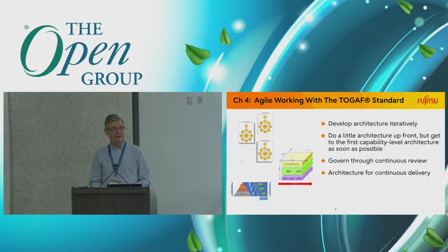So that can often come down to simple things like having software switches through your system so that you can turn bits of it on and off again, and planning in advance how you would roll back a change if it went wrong, and that kind of thing. So these are all the things to think about when you're wanting to create that architecture for continuous delivery.